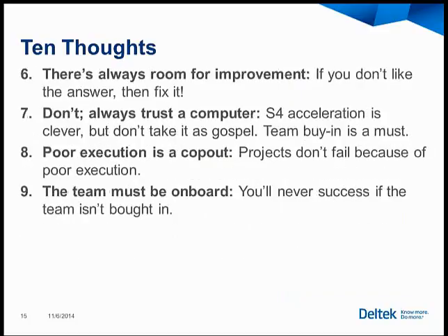Number 6, there is always room for improvement. It's interesting, and this is really true of the S1 to S5. We put them in sequence, which is cool, because it is the sequence in which they should first be done. Establishing the schedule, critiquing the schedule, risk adjusting the schedule, optimizing the schedule, and then communicating the schedule. But through the baseline process and through execution, there is always opportunity to improve. And these are things that once the baseline is quote-unquote baked, which it really isn't, because you can always, like we say here, you can always do better.